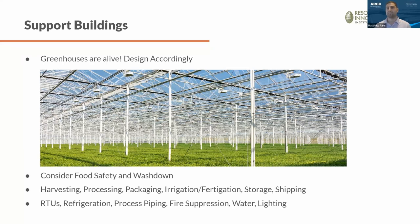If you install steel in the wintertime when the steel is contracted, it may expand in the summer, and you may have tightened bolts. If you install in the summertime and check the bolt tightness in the winter, you could have some loose bolts and connections. So the building moves quite a bit, and it changes even throughout construction and as you make your way into the final days. I just wanted to tell everyone to keep that in mind. Some mistakes have been made in the past during construction by not considering these things, and they really do impact the overall bottom line of construction.